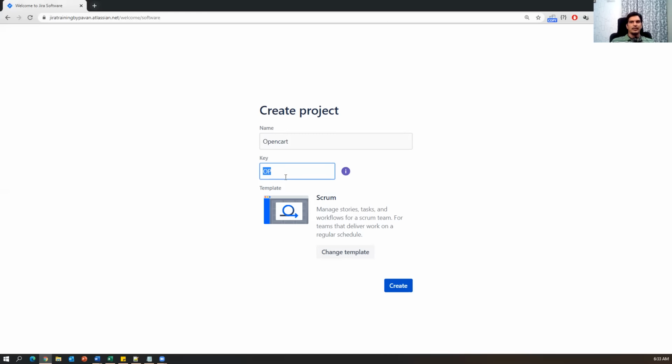For example, when I create a new story and the story contains some ID, let's say 001, it will automatically add this key, let's say OP_001. Similarly, if you add a task, a task ID will be there. Let 002 be my task ID. The task ID will be created by using this key, let's say OP_002. Whatever object we create in the agile process, be it a story, an epic, a bug, or a task, everything is called an object in the Jira tool. And these object names will start with the key. So that key we have to specify here.